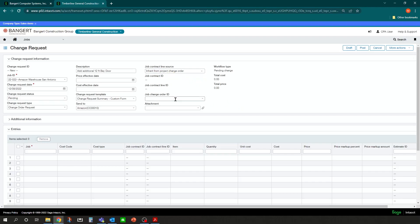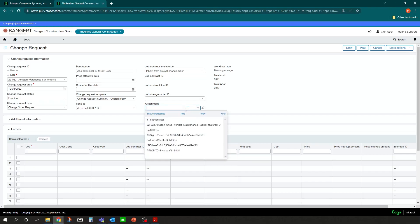We don't have the change order set up yet. We're just at the change request stage. If there is any documentation or drawings or email copies that you want to attach, you could actually attach the files to this change request as well.